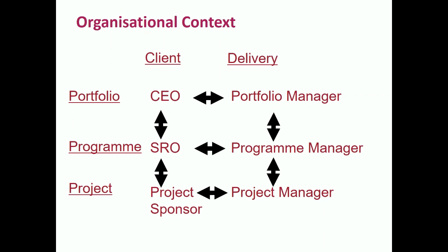And I would always argue that where you have roles and responsibilities, in project world, if one individual is accountable to one person for everything he does, he's probably not really working in project world. Let me take the project manager. The project manager is accountable to the project sponsor for the output of his project, but he's accountable to the program manager for how he does it and how that integrates with the rest of the program.